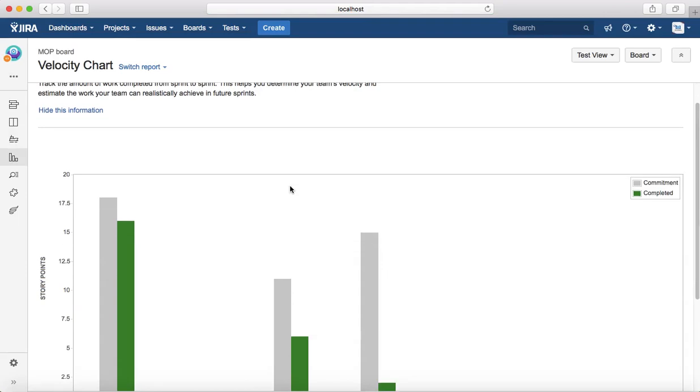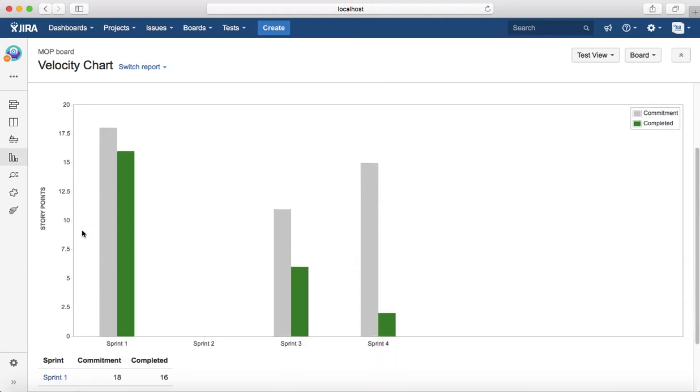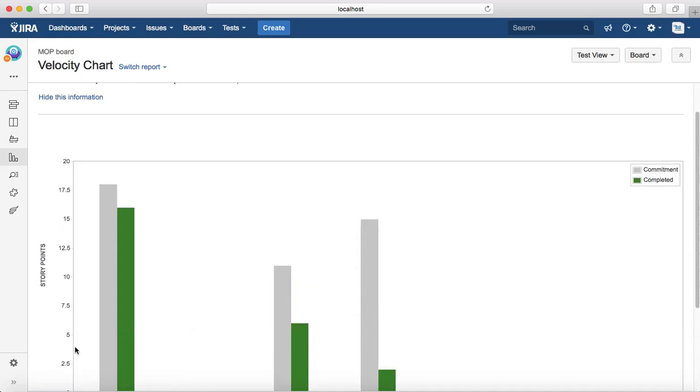It will open the velocity chart. The x-axis is your sprint, the actual sprint that is progressing in the project, and y-axis is the story points that were planned and delivered in that particular sprint. The gray bar you see is the commitment within that sprint.